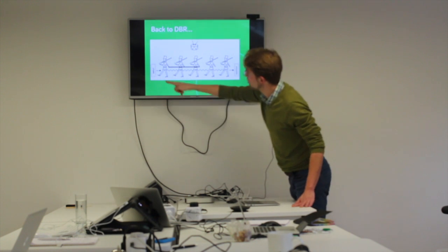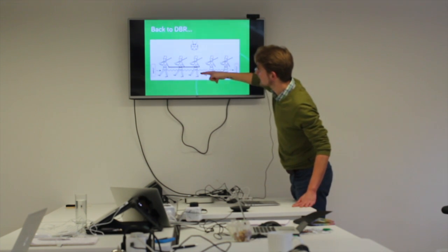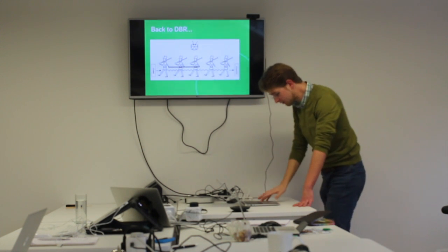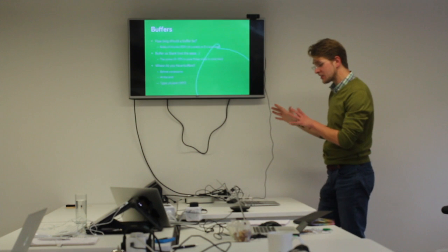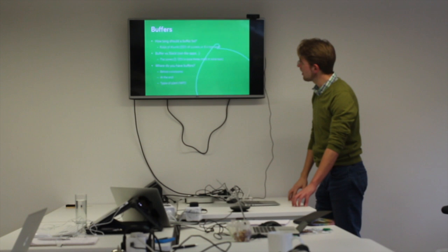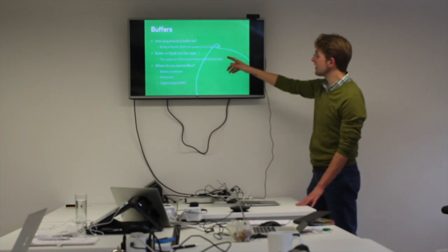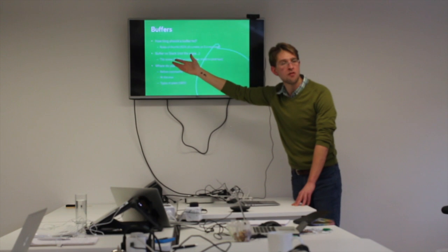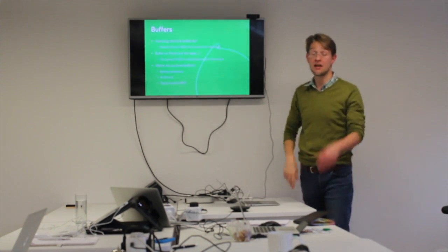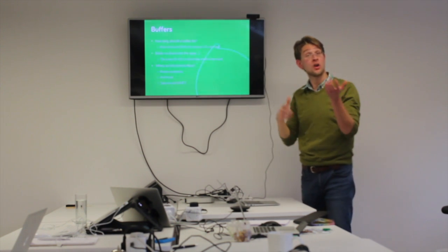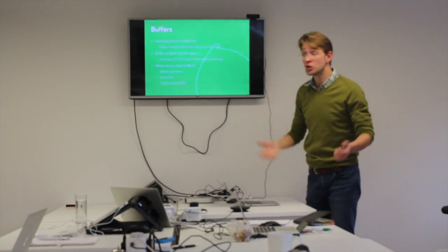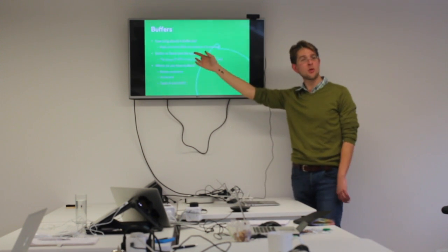And then we have the concept of the buffer, which is the time that it takes work to get from the front of the workflow to the bottleneck. Now the buffer is kind of the most interesting part of this process. One of the rules of thumb of applying theory of constraints is however long it currently takes a piece of work to get from the start of the workflow to the bottleneck, you can probably reduce that by half just by applying this process of buffer management.